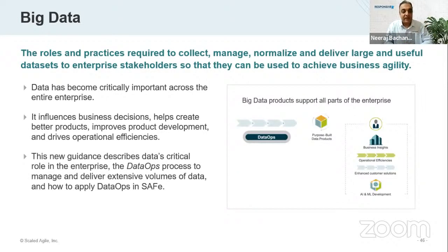One example that I remember we had started to do in one of the organizations was looking at the data of the user stories. We were trying to gauge whether teams are becoming closer to predictability or not. Which means if a team is saying, hey, my story is a three story pointer, is it really getting done in a duration which is in alignment with other three story pointers? So it's trying to gauge how people are putting in the data and how you extract that data to see, is it meaningful? Is it giving some insights or not?